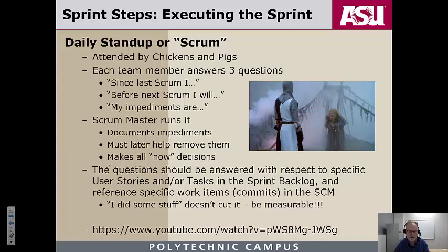Because then everybody goes back to what they were doing and can't get anything done. They're blocked. All right. So the Scrum Master makes the now decision, keeps the team moving, and if that decision needs to be revisited in light of later, better information, then it will be.